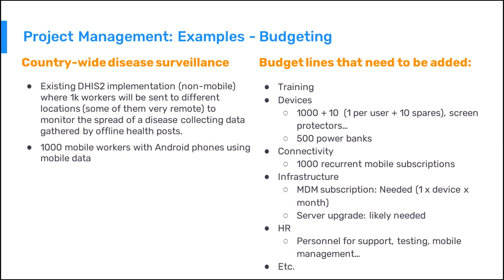In the second scenario, a thousand workers are collecting data in a remote area with difficulties having an internet connection, which means mobile data is a must for synchronization. The budget increases due to training — with such a large number of users, training of trainers will be needed — a large amount of devices including at least 1,010 devices with power banks and accessories for rough environments, mobile subscriptions so users in the field can synchronize, an MDM due to the large number of devices, server upgrade to support the amount of data to collect, and personnel for testing and user support.